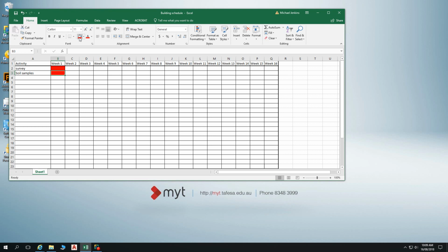Okay, following our site survey and our soil samples, site preparation. What sort of things do we do with the site preparation? Well, the site's got to be level, it's compacted. It's marked out for the footings. All the health and safety regards to fencing, and possible marking of where the water and sewage go. Fantastic. All right. How long is that going to take?